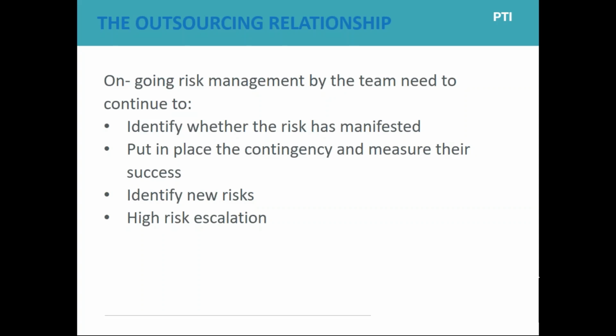And then whenever you're working through the project, you need to do ongoing risk management. So I would suggest that risk management of the project is something that if you have regular study team meetings with the service provider, you may want to have on the agenda, say monthly, just to have a quick review to see if any risks have disappeared, if any have manifested, and if any new ones have arisen, and if there's been any change in the status of previous risks. And this is something that you need to keep doing throughout your outsourced project.